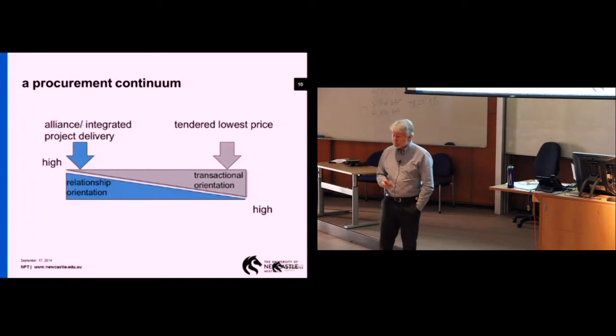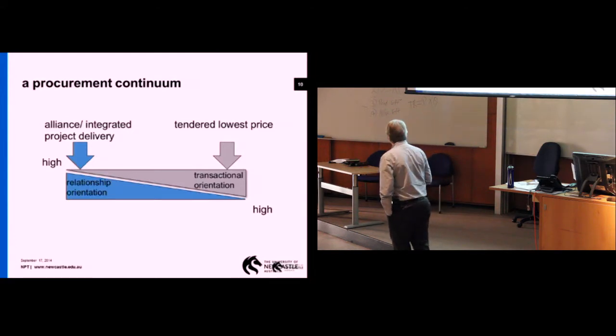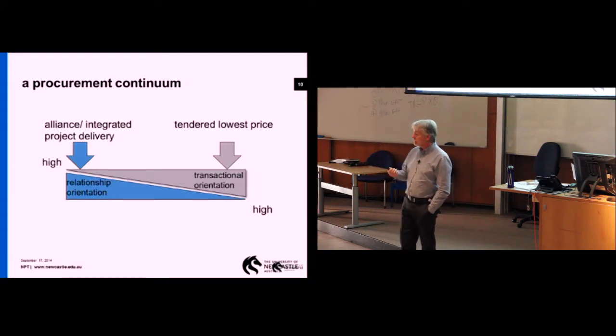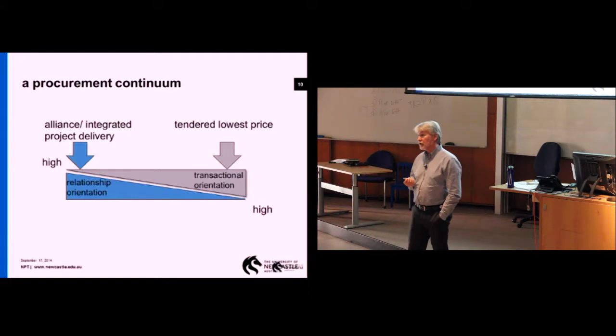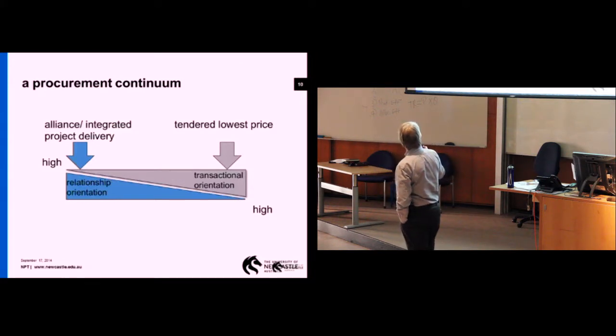A procurement continuum. This really identifies the myriad alternatives that you can have in procurement. I've identified two of the poles. On the right, we've got a tendered lowest price, design-bid-build type of procurement. You can see that it's very high, as I describe it, from a transactional perspective. It's a one-off type of thing, very transactional, very arm's length. In my view, there's not much opportunity to build relationships within that.